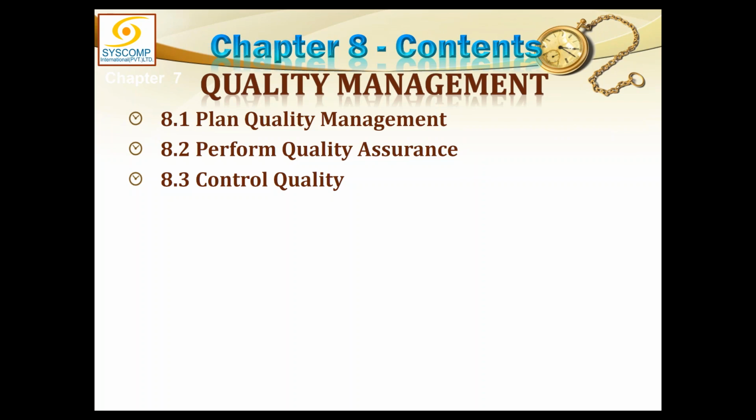So essentially speaking, process improvement plan has to do everything with quality assurance, but quality management plan creates both the plans for the quality assurance and for the quality control. Quality assurance will deal with the process of the project, and quality control will deal with the product of the process. Although there is a relationship between the product and the process as far as the quality is concerned, there is no direct link between the two, except that quality assurance can seek a lot of guidance by the defects which have been caught in the deliverable during quality control. So we'll talk about that.